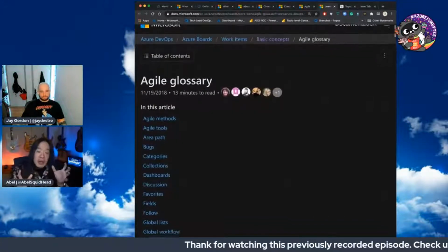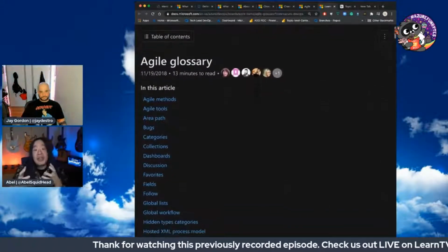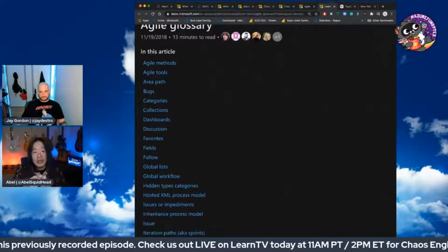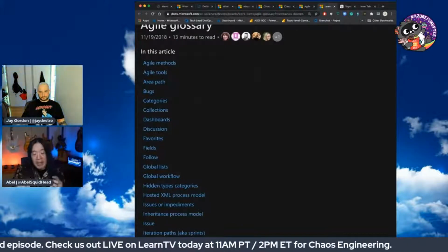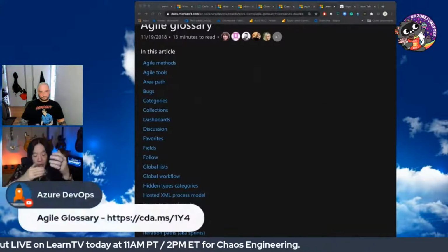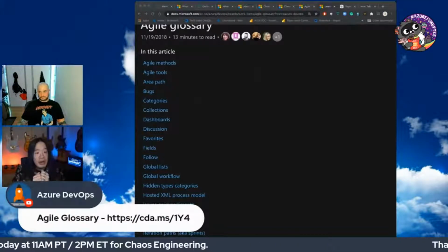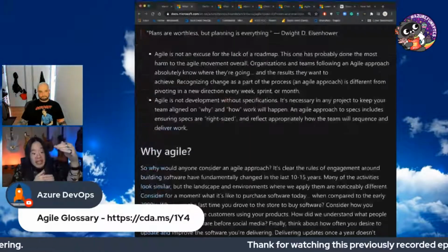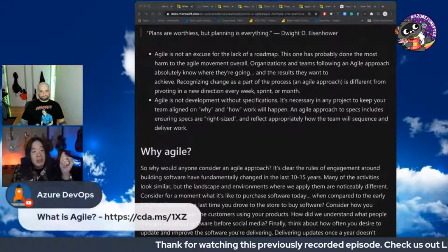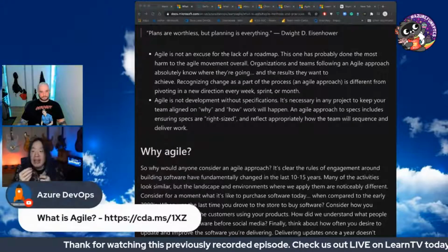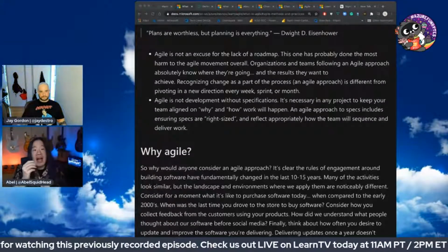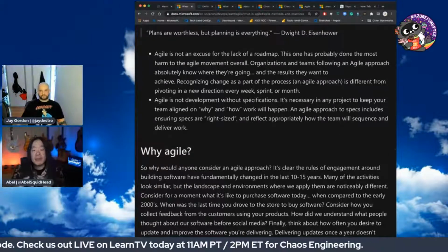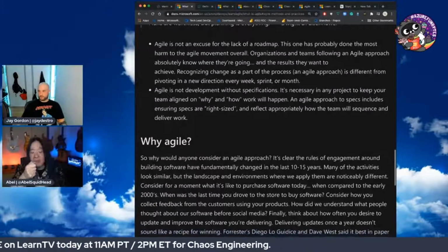But then you'll have somebody, a product owner, somebody that has a stake in the product, someone that can decide what the product should do. The product owner will then look at this product backlog and prioritize it and say, which one of all these ideas is most important? And then that's when the dev team can look at this prioritized list, start from the top, work their way to the bottom, right? And they'll look at it and be like, great, from this prioritized list, I think we can do the top 3 items. I think we can get it done. So let's commit to it. For the next sprint or for the next iteration, let's do those first 3.